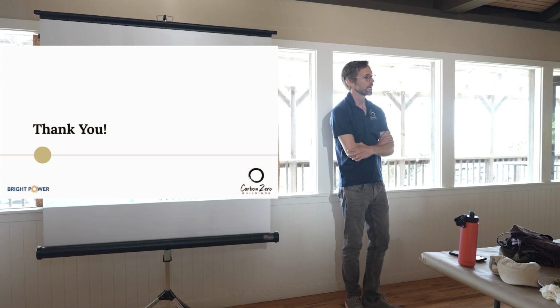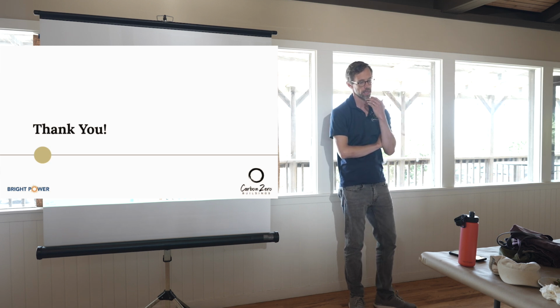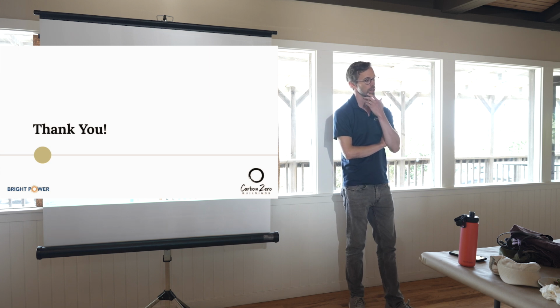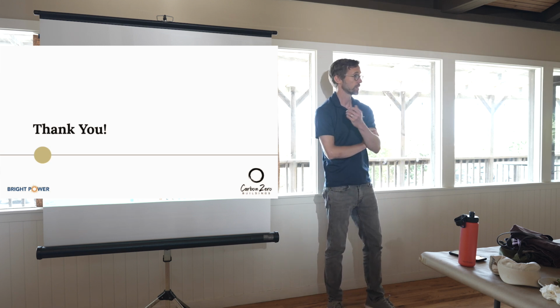We do try and keep it to a minimum because a lot of times people aren't home, and we try and keep it simple, like with a new heat pump water heater and the new HVAC unit. At the end of the day, we'll have a one pager that we'll send in before and afterwards, saying this is what we're going to do, this is what we did, this is how it affects you. But really, life doesn't change for them all that much. When they want hot water, they open the tap and they get hot water. When they want it to be colder or warmer, they set the thermostat accordingly. We even left their original thermostat in place in this case.